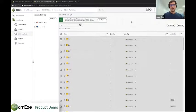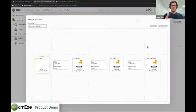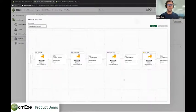Inside that tag, there are stored workflows and types of parts, things like this, that have already been set up in your organization for curtain wall in this case. If your curtain wall process flow is about the same every time, depending on what factory you are, you can store that workflow inside there. In this workflow, you could have a workflow for in-house fabrication and a workflow for outsourced fabrication, and the workflow will be slightly different.